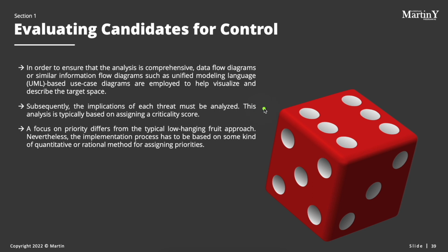This analysis is mainly based on assigning certain criticality to the threats. This means determining which threat has higher probability to happen and which threat would cause the highest harm. Obviously, such a threat would be with the highest criticality. So a standardized criticality score is an important part of the threat modeling process